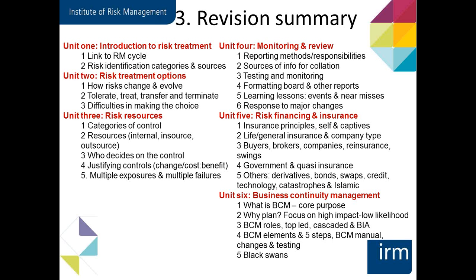A good lot of principles there. Don't forget this idea, though, I've already mentioned it once before, that transfer needs to be combined with treatment. So in other words, you'll generally want to treat the most severe aspects of the risk, the high likelihood, high impact elements.